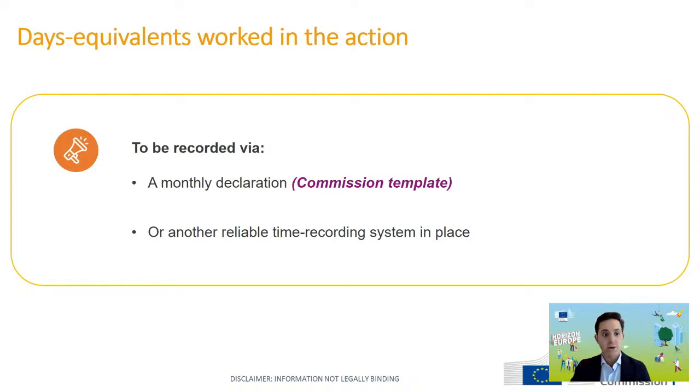However, the second option is that you already have a reliable time recording system that fulfills the minimum criteria, and that you prefer to use that. Either of the two options is good as far as they provide a way of measuring the day equivalent work in the action.